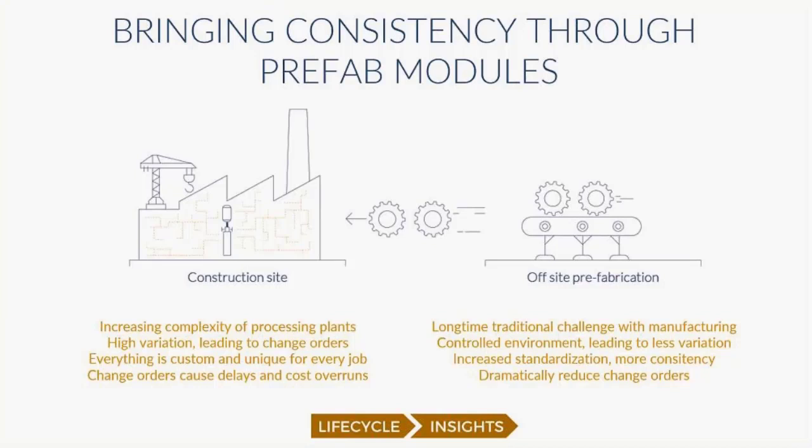And from there you hook it up, you run everything you need to run between everything, electrical, piping, interconnect, whatnot, and this reduces the variability that you see at the construction site or the overall project, right? Because you're removing variability, you're improving repeatability, and you have fewer change orders overall.